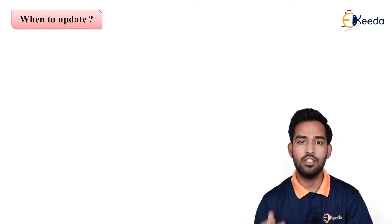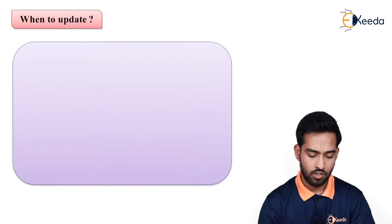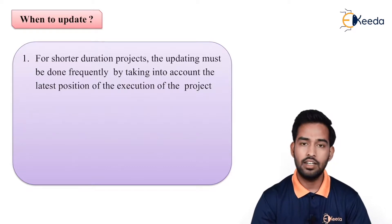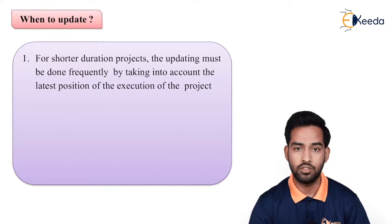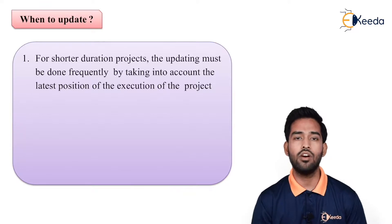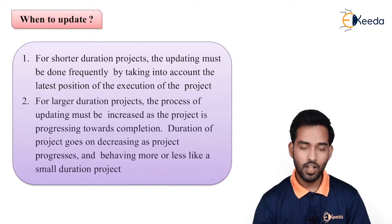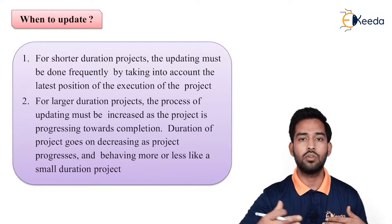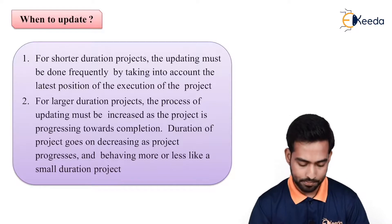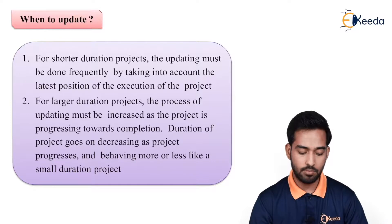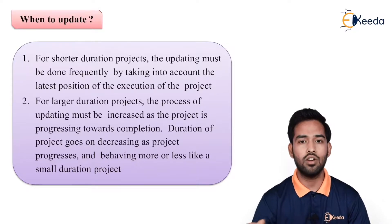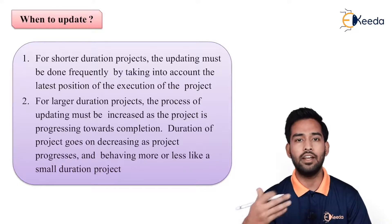Then, when to update? For shorter duration projects, updating must be done frequently, taking into account the latest position of execution of the project. For longer projects, the process of updating must be increased as the project progresses towards completion. As we go towards completion, we have to increase the frequency of updating. Duration of the project goes on decreasing as the project progresses and behaves more or less like a small-duration project. So, as we go further in a longer project, it starts behaving like a shorter one and we can update it frequently as well.